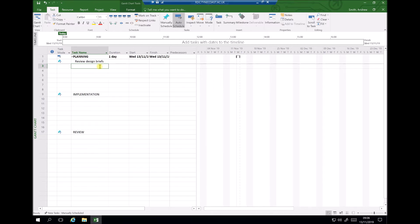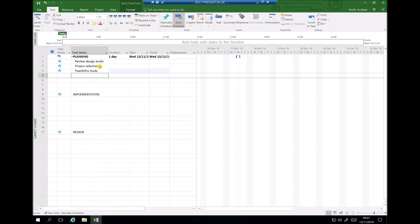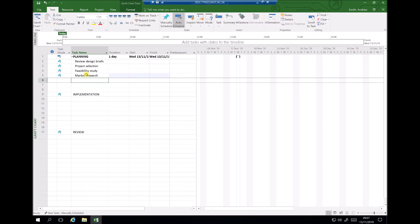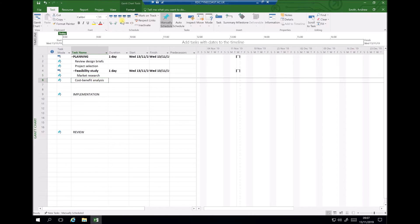Once we've reviewed the design briefs, we need to select a project, so we add 'Project Selection.' Once we've selected our project, we carry out a feasibility study — each of these steps are discussed in the project handbook. All these tasks sit within the planning subset and have been indented. As part of the feasibility study we might want to conduct market research and also do a cost benefit analysis. These are subtasks of the feasibility study, so we indent them further.